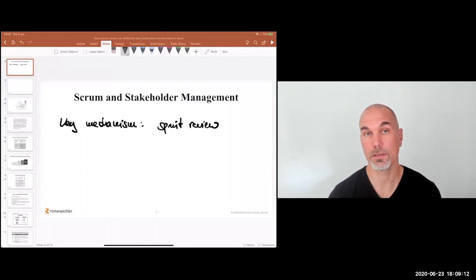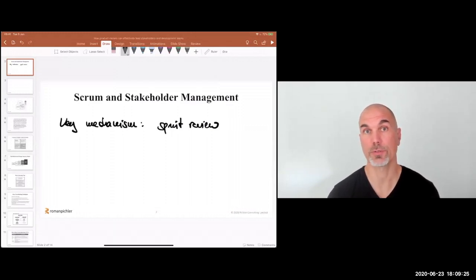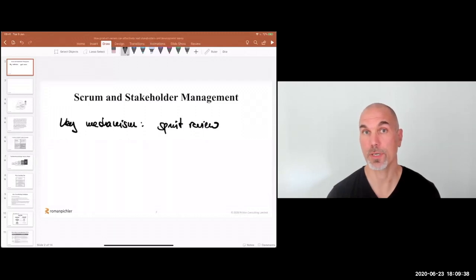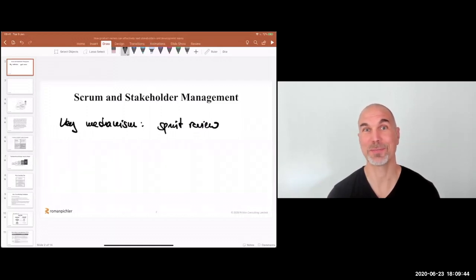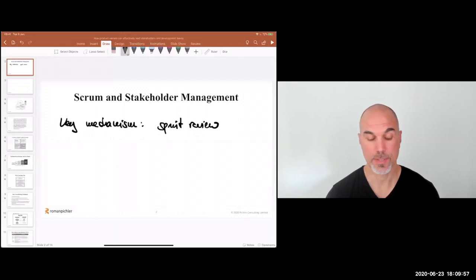If you validate that you're doing a good job meeting user and customer needs — for instance by releasing the product increment — then often the sprint review has more of an internal focus. It's about updating the stakeholders and benefiting from their perspective, their ideas, their concerns, and using that to make the right product decisions and validate that the product is, for instance, serviceable or sellable, or that the marketing person knows about the progress and is adapting the marketing strategy accordingly. That's really the key mechanism.